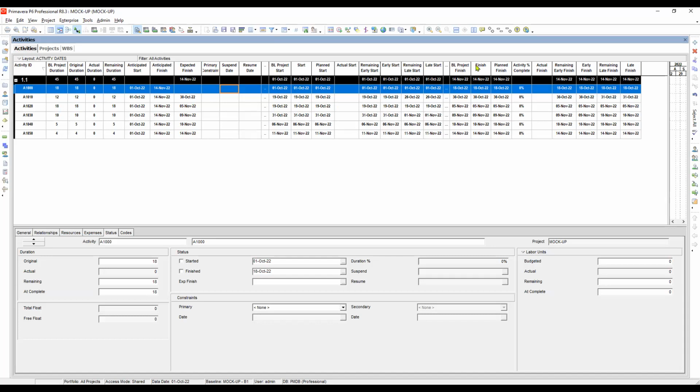So looking at our schedule here, this program has not yet been updated, right? We have not yet started this one. Do we need to show the baseline bars here? I think not. If you look at the start date here, from here down to here, since this has not yet started or been scheduled, the start dates are all the same for all types of dates, right? Starting from the baseline start, planned start, remaining early start, they are all the same. And also on the finish dates, they are all the same since it has not yet started or been scheduled.